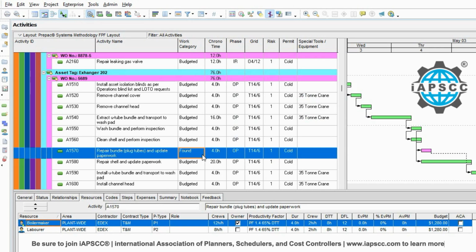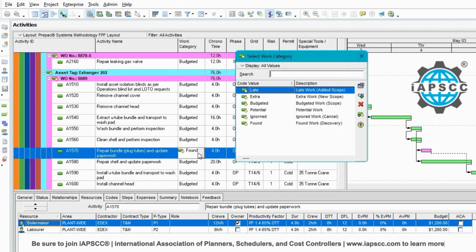So this really helps me to run my what-if scenarios, my SimOps, constructability reviews, density modeling, taking a look at all the different things that what if this happens? What if I do get this work? How much work is it? Do I need to change my contracting strategies or talk to different vendors? Do I need different resources? Is it going to affect cost? How much is it going to draw down on my contingency? A number of things that I could use it for.